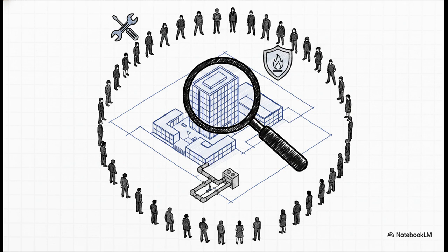Maintainability, for instance: can a technician actually reach the HVAC components to service them? Or life safety: are the fire control systems practically laid out? And infrastructure: is there enough campus telecommunications capacity? We bring in the end users too, just to make sure programmatic requirements like specific spatial adjacencies are fully baked in.